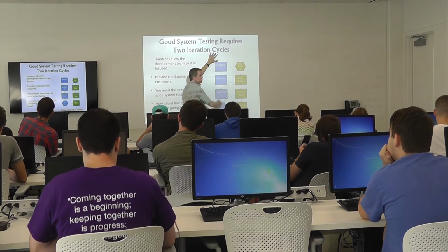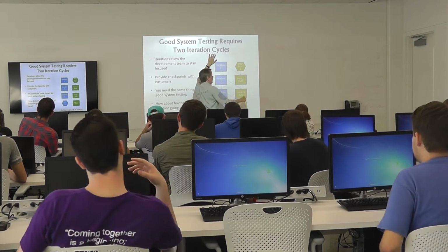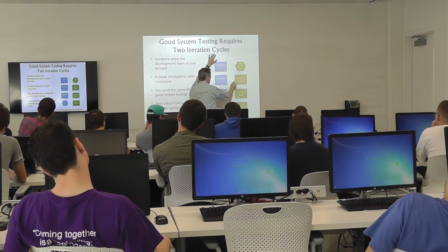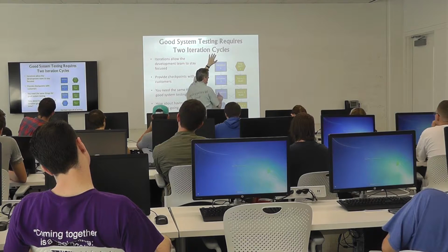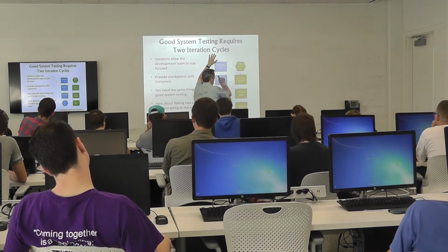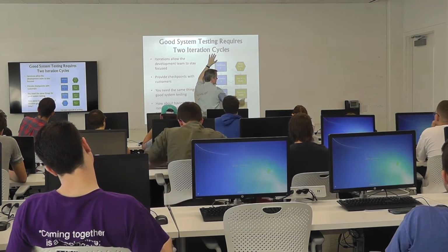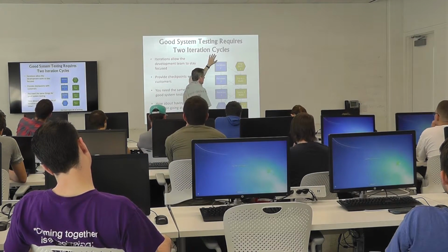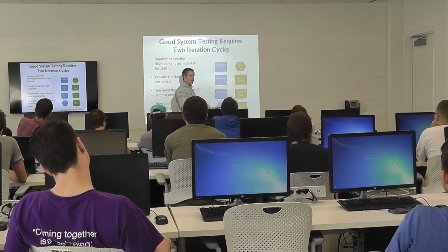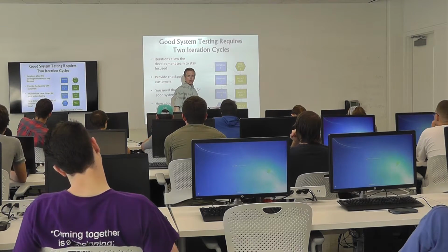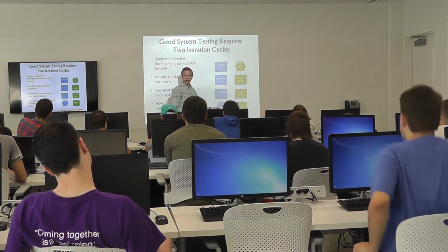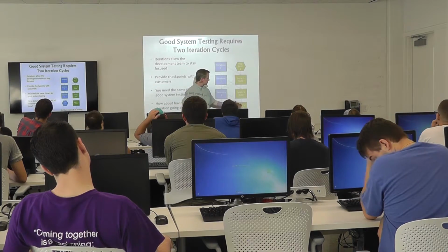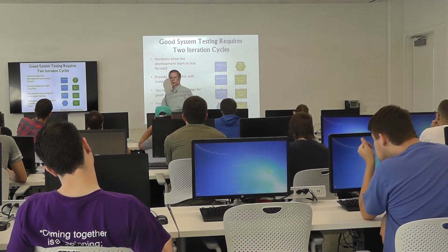Now, when they reach the end of iteration 2, which of course is a month later, you need to have your testers done testing iteration number 1. That means all the bugs and all the errors that they found go to the software developers to work on in iteration 3. Meanwhile, iteration 2 gets moved over into the testing environment, and now the testers start working on it. Okay, iteration 3 gets done. Now what you probably want to do is have your software developers take a break for an iteration and focus on nothing but fixing bugs, because you've actually got 2 sets of bugs that are going to pass on to them. Meanwhile, testers can be working on testing iteration number 3.